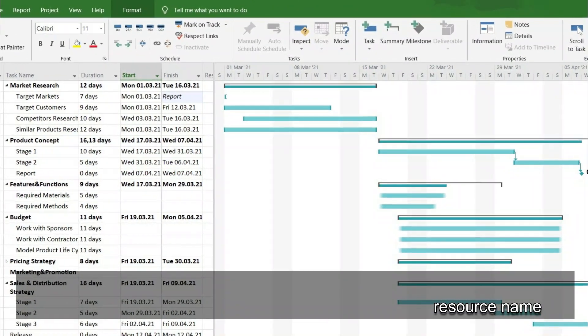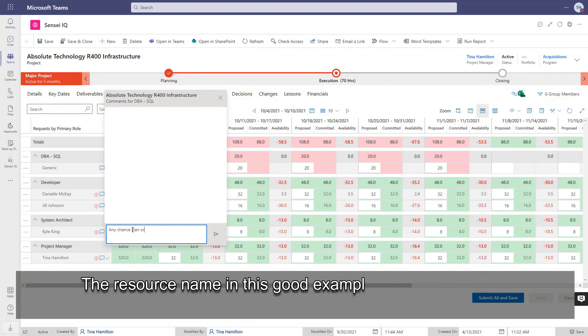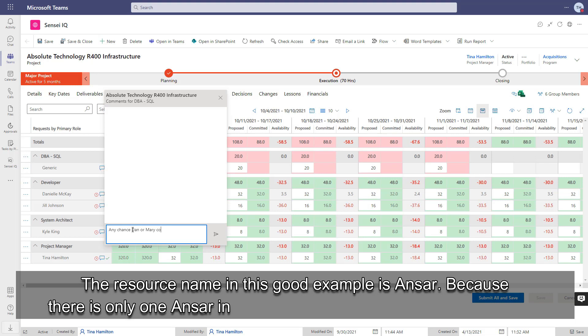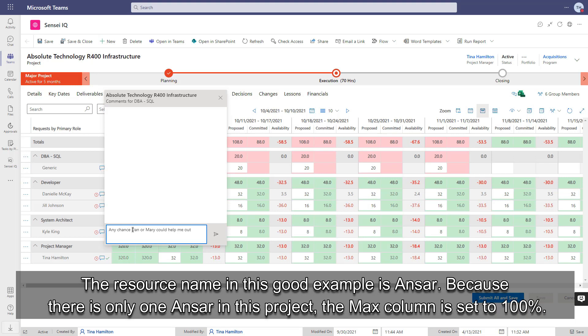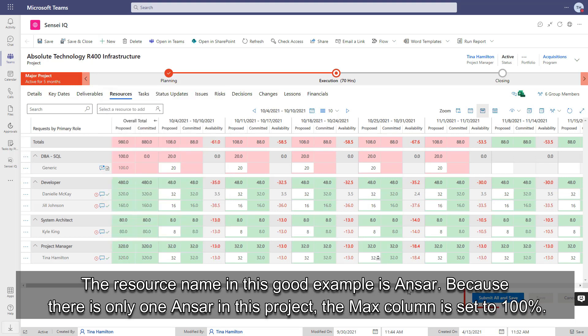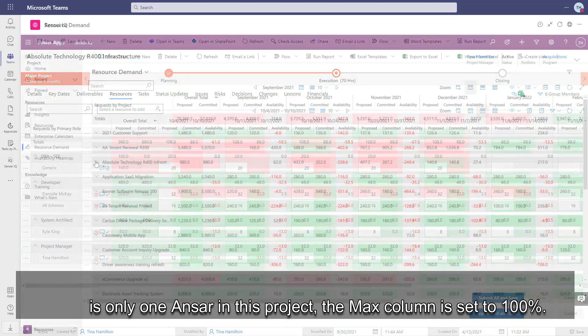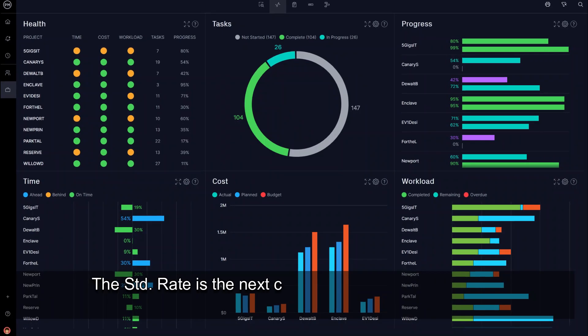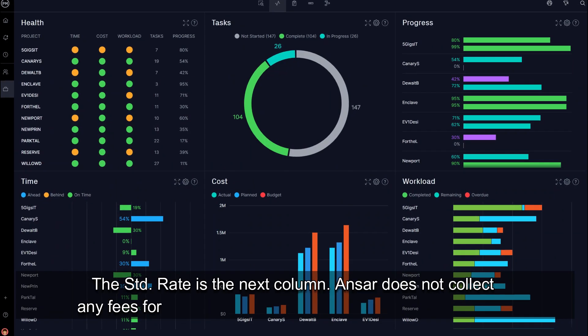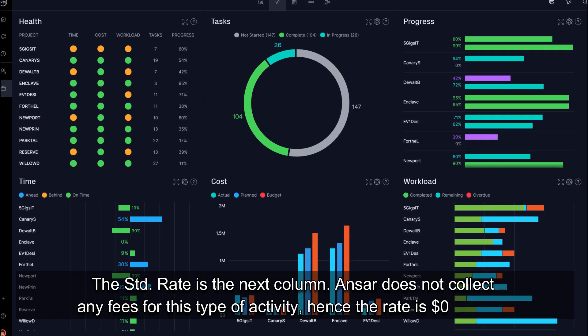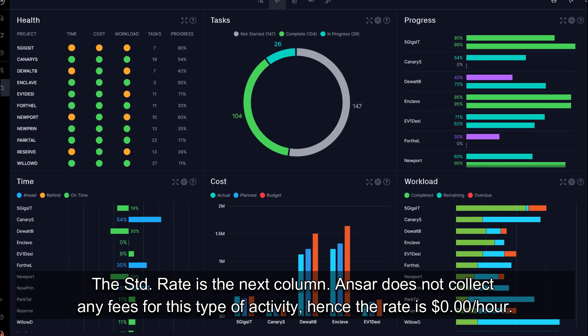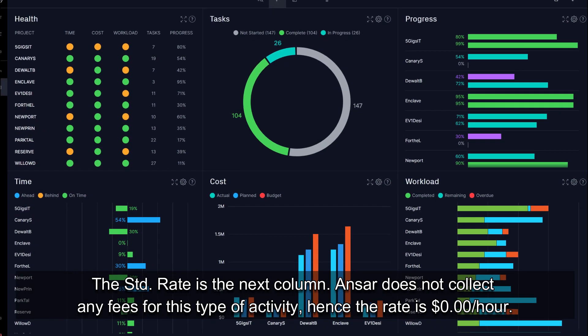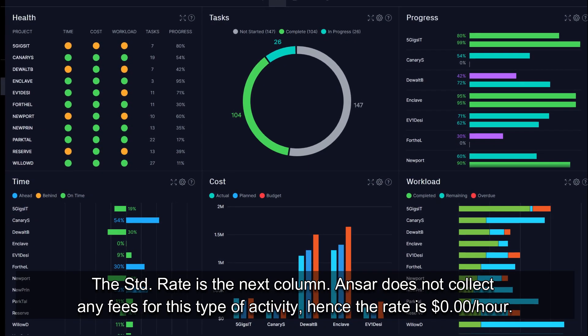The resource name in this good example is Ansar. Because there is only one Ansar in this project, the Max column is set to 100%. The standard rate is the next column.